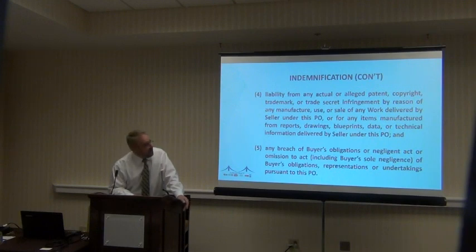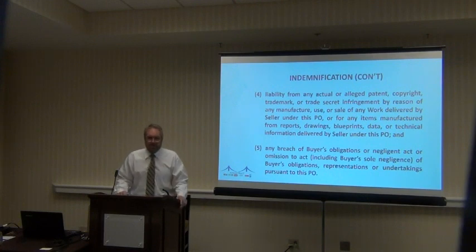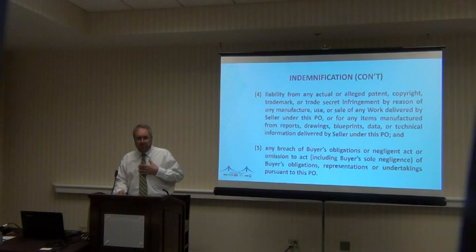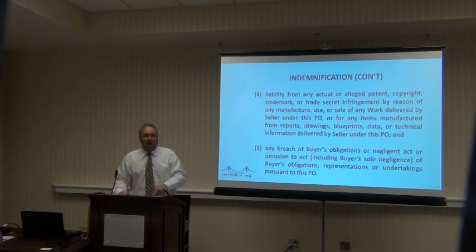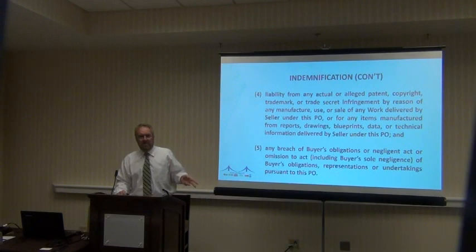How I try to solve 4 is I try to say, if I, as the contractor, call for it, specify it, bring it on site, determine that it's needed, use it, because I decided to use it, I'll stand good for it. I'll stand for all that stuff. But if you, Mr. Owner, and your architect called for me to use this kind of widget that I had nothing to do with choosing, don't ask me to indemnify you if the widget company shows up with a case for patent infringement. That's not my deal, that's your deal. So I try to separate it that way. And I find that works.